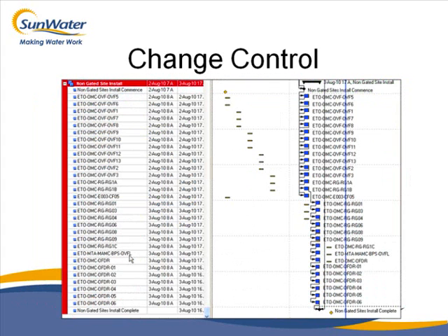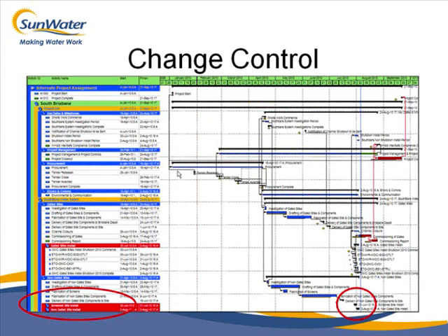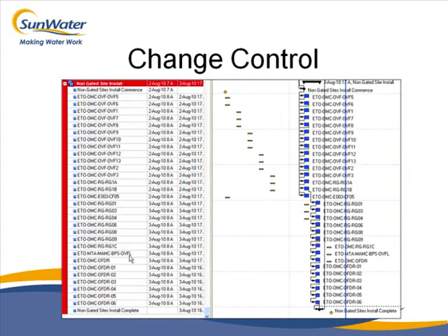and then we find that these activities down here actually finished earlier. So here's our baseline. These are our baseline activities. Because they were delayed a week, we started a week later, we were behind. But we found that the guys up here installing these gates finished theirs and were able to bring another team down. So we brought another two guys down, and they're actually installing more sites, more components than originally thought.